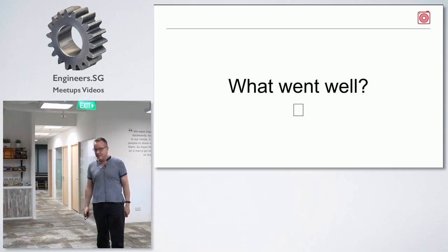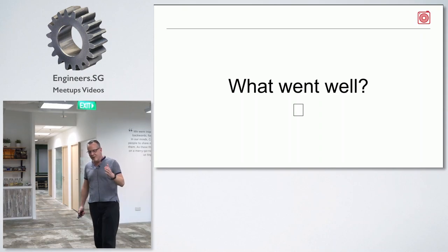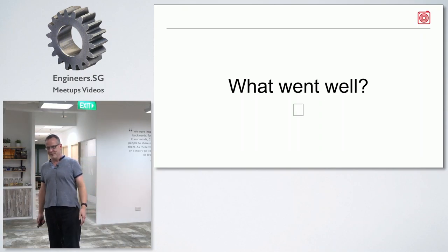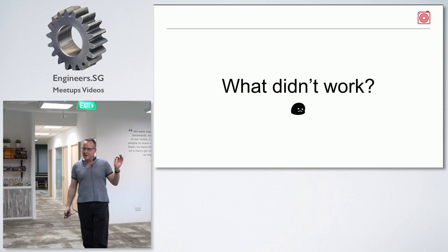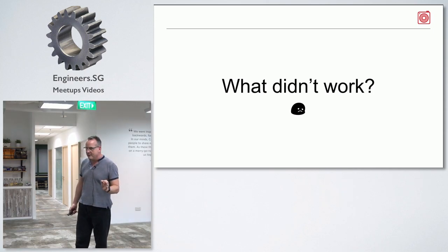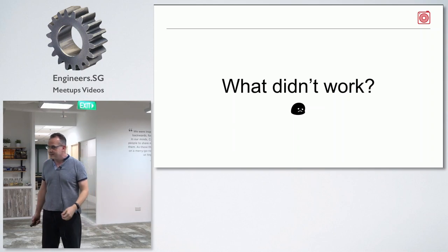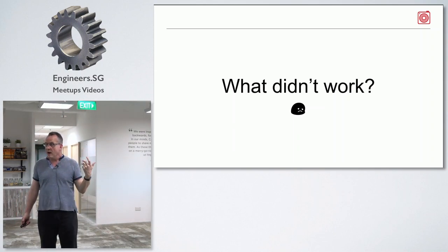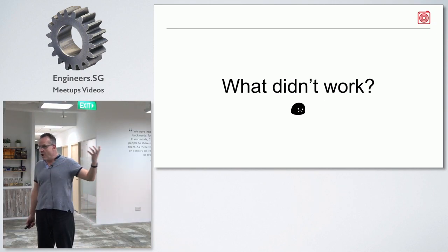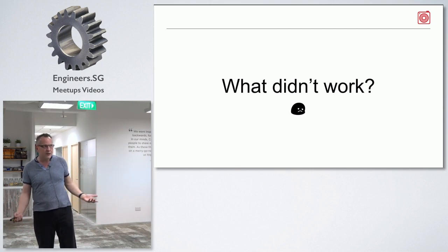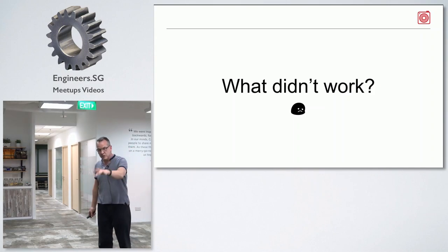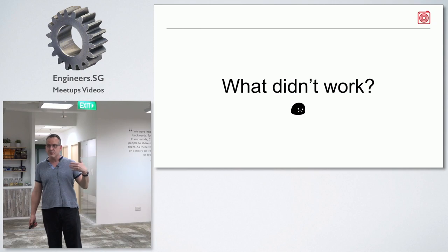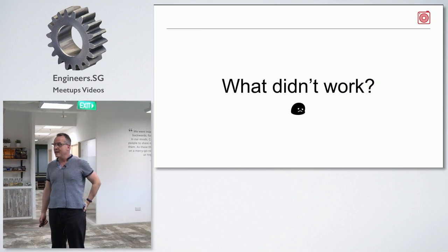is it keeping you from being effective? Or what went well? You know, continue to go out to drinks every Friday night, because it works. It makes us work well. So for each one of these, go through and as appropriate, if you're using Jira, open Jira tasks or bugs. If you're using something else, like Trello, put Trello cards in. Have a card for an improvement. Here at Carousell, in Jira, we have a project called CPI, Carousell Process Improvement. We shove stuff in there. We identify things in retrospectives. We capture it.